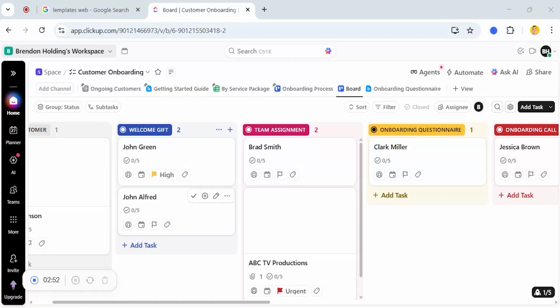So why does this cause slowdown? When you combine too many columns with stalled cards and no clear ownership, the result is predictable. The work takes longer, teams lose trust in the board, and people fall back to messages and meetings. At that point, the Kanban board stops being a workflow and becomes a visual backlog.